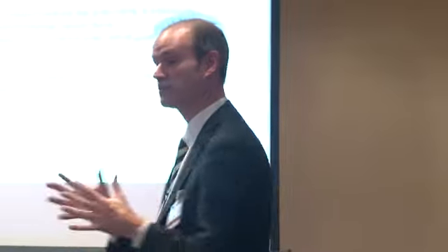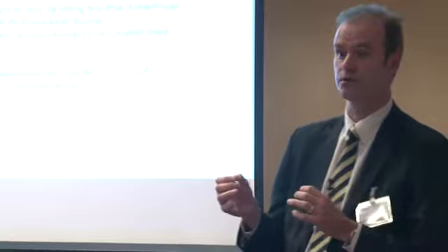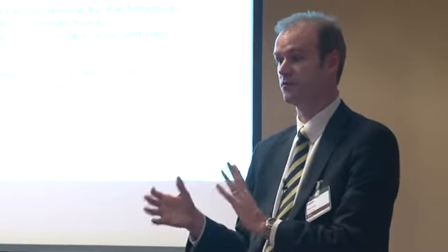There's also something called terminal float in the NEC form of contract, where if you show a planned completion before the completion date, then that is the terminal float, the period at the end of the project when you say, I'm going to finish my work, say at the end of January, the completion date is not until the end of February. That month of February is float, it's called terminal float, and it belongs to the contractor.